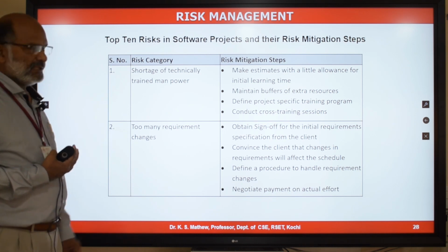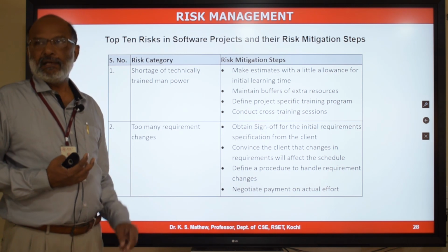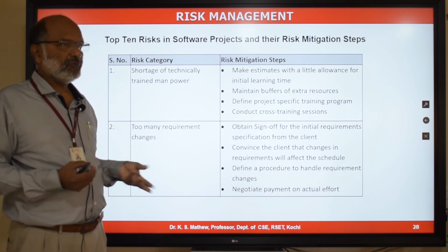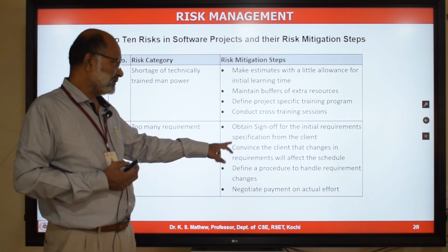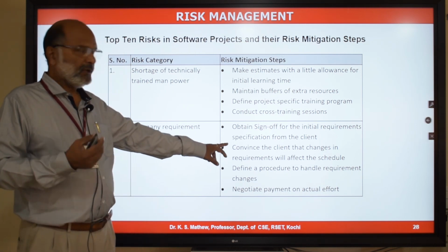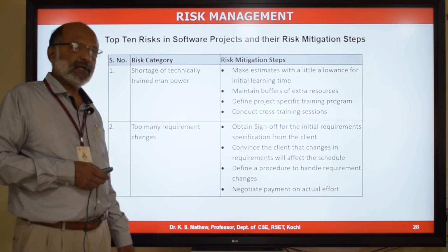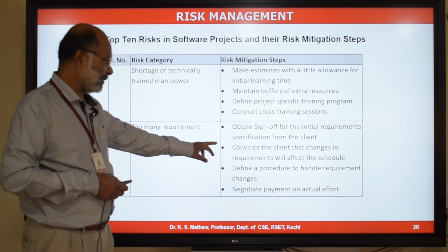Too many requirement changes. Obtain sign-off for the initial requirement specification from the client. After making the SRS, get it signed off by the client. Convince the client that changes in requirements will affect the schedule. So whenever they come back with a change in the requirement, you need to convince the client how it is going to affect your schedule and the cost.